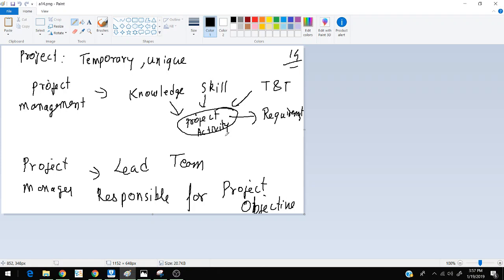But in industries like construction, you will still follow PMP, traditional project management. Unfortunately, that's how it is in construction. You can't go and put pillars up if your foundation isn't ready yet. So there are certain processes that have to be followed.